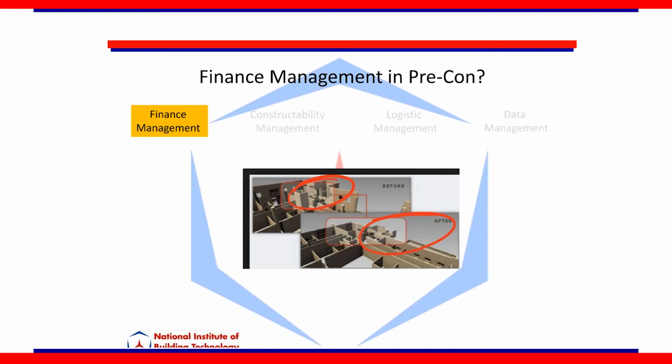So when you move a wall, or you add a wall, or you add a bathroom, I think there has to be an updated forecast schedule, a cash flow schedule, a budget schedule, whatever you want to call it, to the client every week or bi-weekly, so they understand what changes are happening in the design. What was their intent before and what has happened?